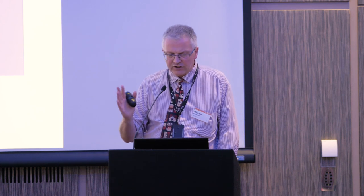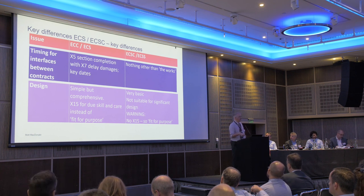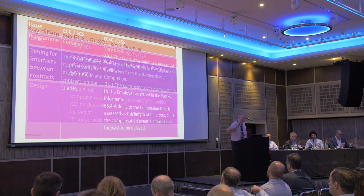Design is interesting: the ECS has a simple process at 21.2 — submit and accept designs. The short contract is even more basic, and I would say the short contract is not appropriate if you've got significant contractor design. Importantly, in the short contract, design is fit for purpose as standard — there's no X15 equivalent. Subbies need to know that, and I think contractors should be adding in an X15 if they're trying to use a short subcontract.